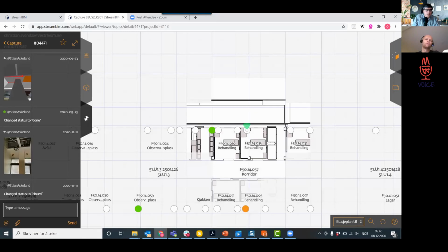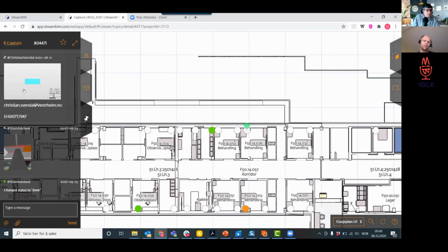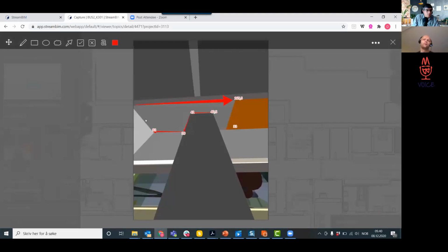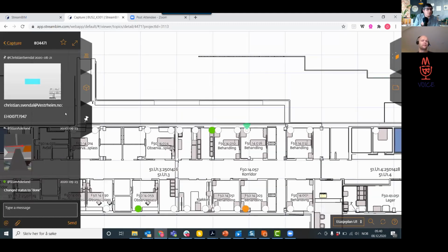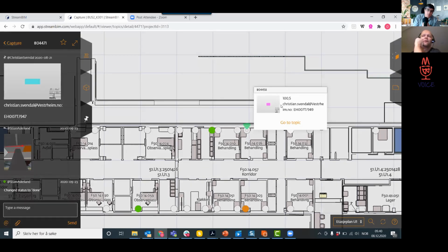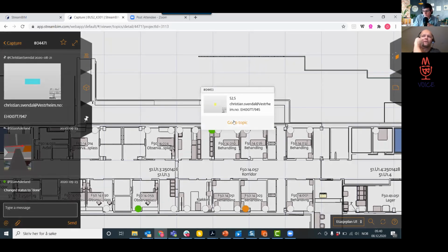So how they worked was they created it in Solibri, BCF, import, and then somebody went out on site and measured each and every one of them exactly. Then it was ordered through the Excel order, including the measured options. But what you then get is the ID of all of those panels on this floor, uniquely, on all points here. So as a man installing this on site, you also know exactly which panel you are to bring to this room.